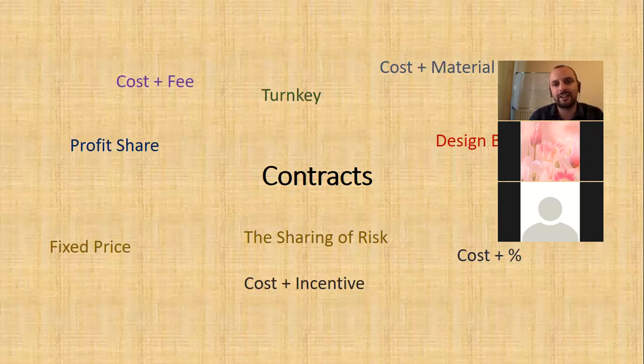What's another type of contract that I could use which will encourage the contractor to keep costs down? I don't have any other idea. What's by far the most common kind of contract? Lump sum. Yeah, lump sum or fixed price. So the contractor says, okay, I will build this dam for $100,000. He's going to be paid $100,000 regardless. He's taken on entirely all of the cost risk himself. The buyer knows, even if the costs overrun, I'm still only paying $100,000. So basically when they tender that out, they're competing for the lowest price. That's one of the key things they look at in the tender evaluation.